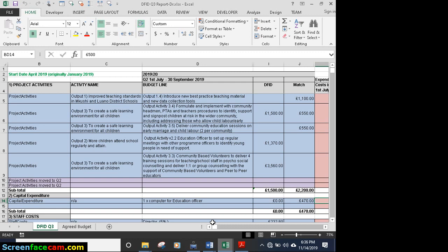I said to you that nowadays also almost every funder wants you to do an activity-based budget, okay? So they want you to detail out each activity, okay? And then they want you to cost each activity in terms of how much that activity will cost, which means you're less likely to fail because you make sure that you put in the total cost of that activity.